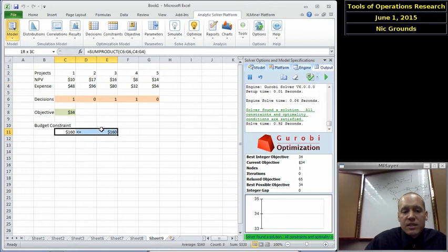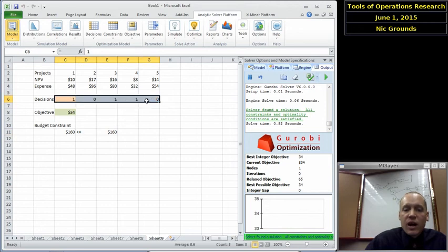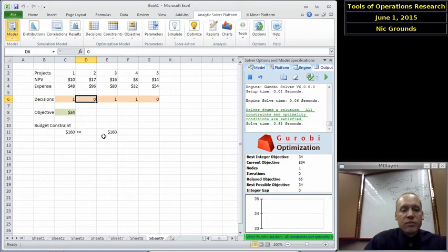That doesn't mean the budget is not constraining. It means that the combination of the budget and the constraint that you can only do a project or not, you can't half do or fractionally do any projects, those two constraints together become binding in that you can't do one more project because of the budget, but you can't increase how much you spend closer to the budget because you can't do partial amounts of a project. So those are the binding constraints in tandem with one another.